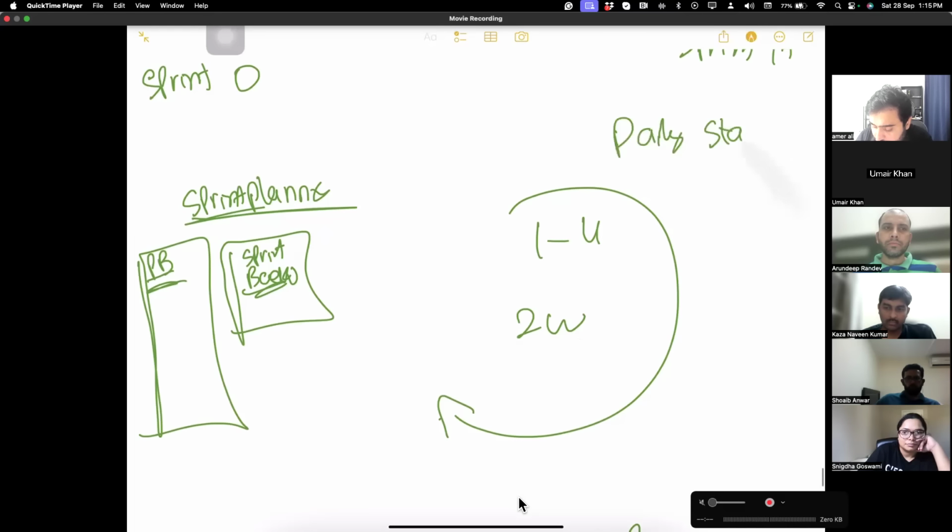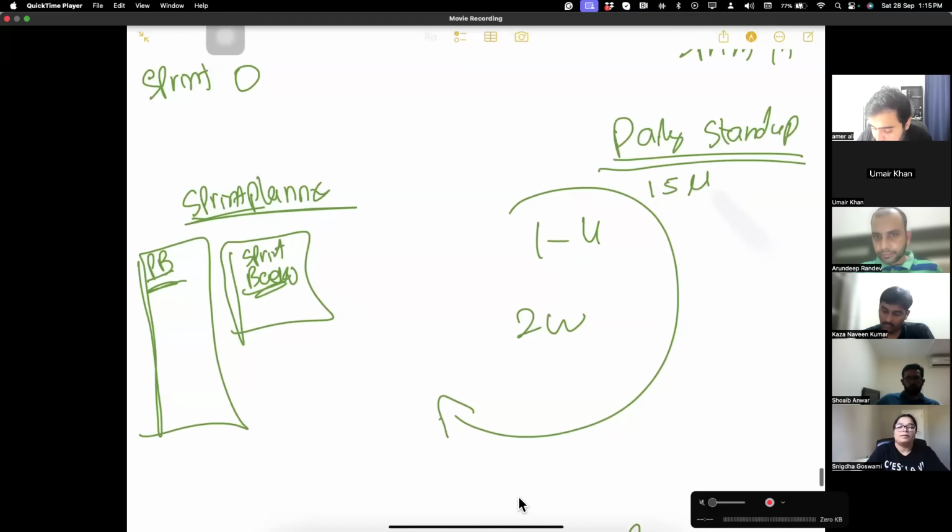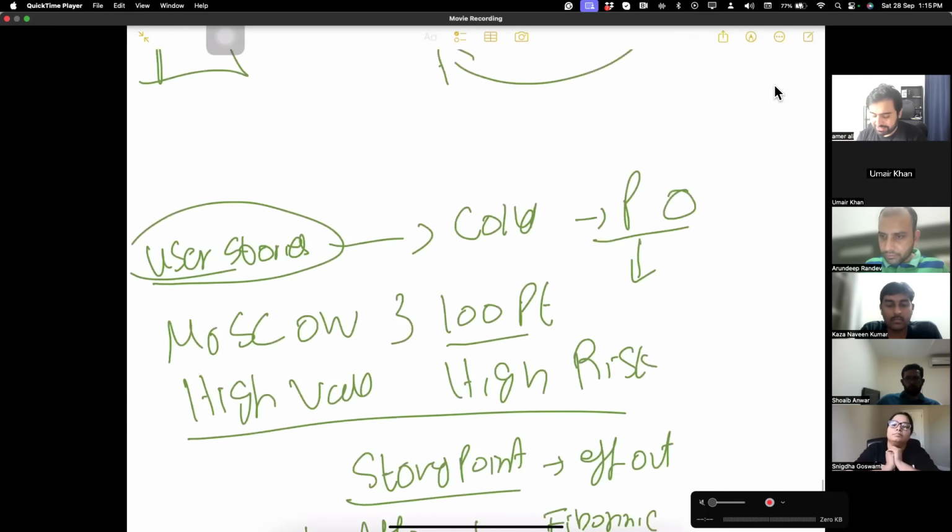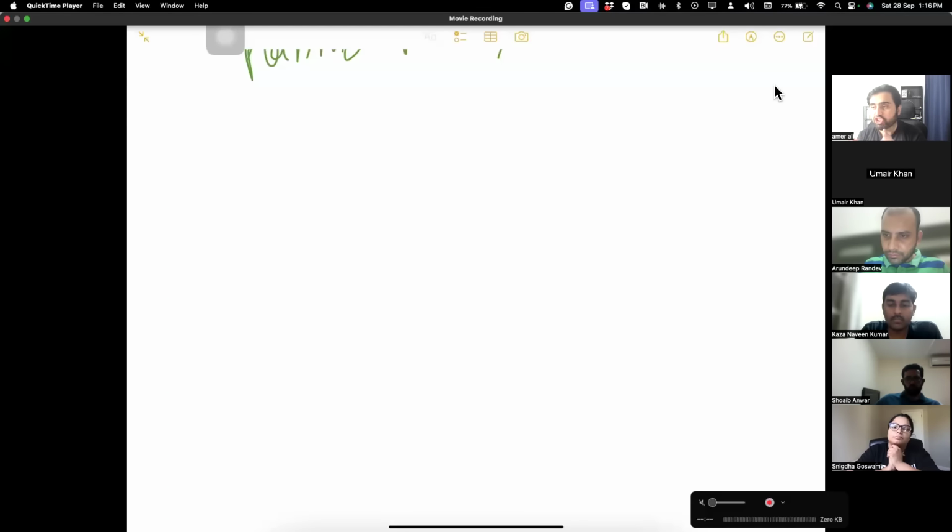What are the 3 questions of the daily stand-up? Please put them in the chat box. It's a 15-minute meeting, same time, same location, 3 questions. It's a progress sharing meeting. There is no detailed discussion, only progress sharing. So Nidya, I don't see you typing. The 3 questions are: what you did yesterday, what you are going to do today, and is there any problem there. As I said, it's a progress sharing meeting.